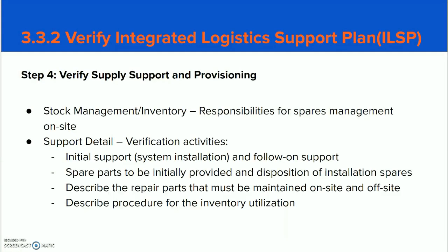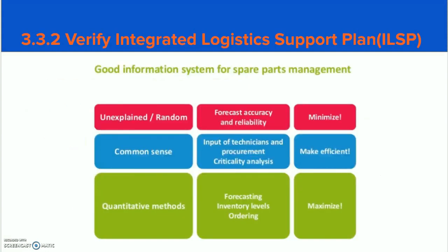Step 4. Verify supply support and provisioning. This includes verification activities for initial installation, repair parts on site and off-site, and procedures for inventory utilization. This is a simple explanation of how spare management will be prioritized. If there is no explanation for the use of the spares, then we'll minimize their use. If it is common sense based on the input of the technicians, then we will consider a moderate use of the spares. And if by the use of the quantitative methods and based on forecasting, it is reasonable to supply more spare parts, then they will be supplied.